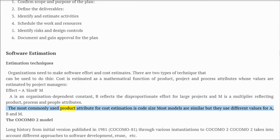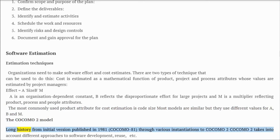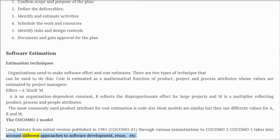The most commonly used product attribute for cost estimation is code size. Most models are similar but use different values for A, B, and M. The COCOMO 2 model has a long history from its initial version published in 1981 (COCOMO 81) through various instantiations to COCOMO 2, which takes into account different approaches to software development including reuse.